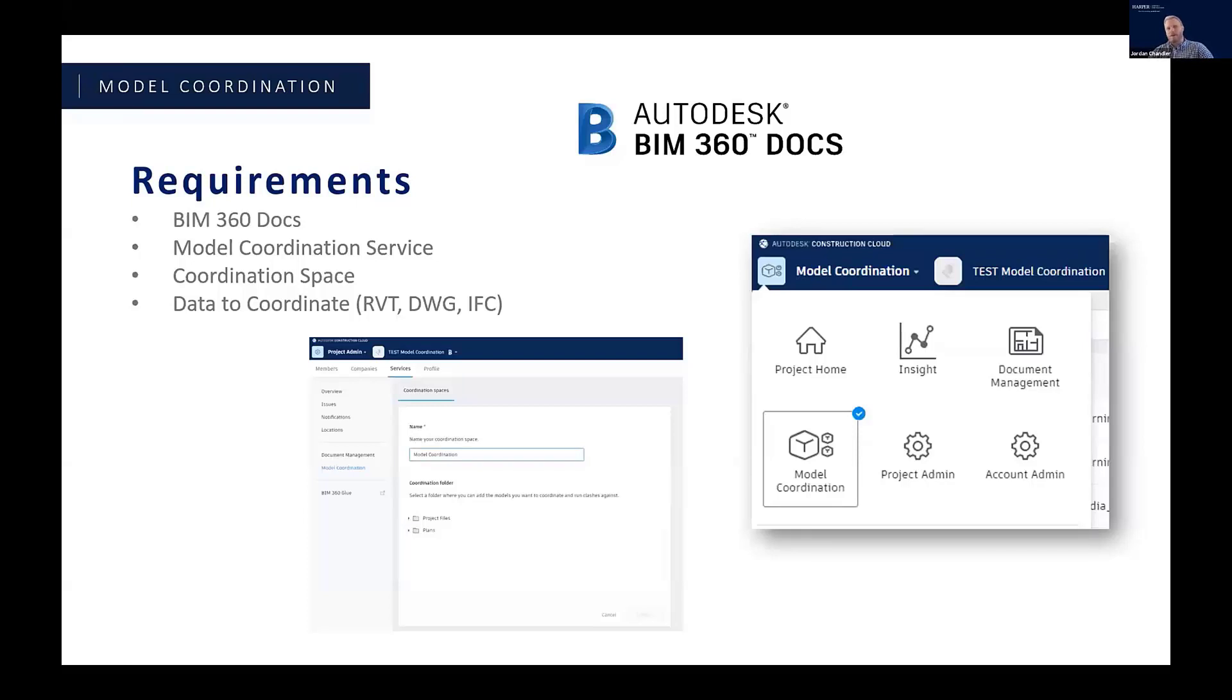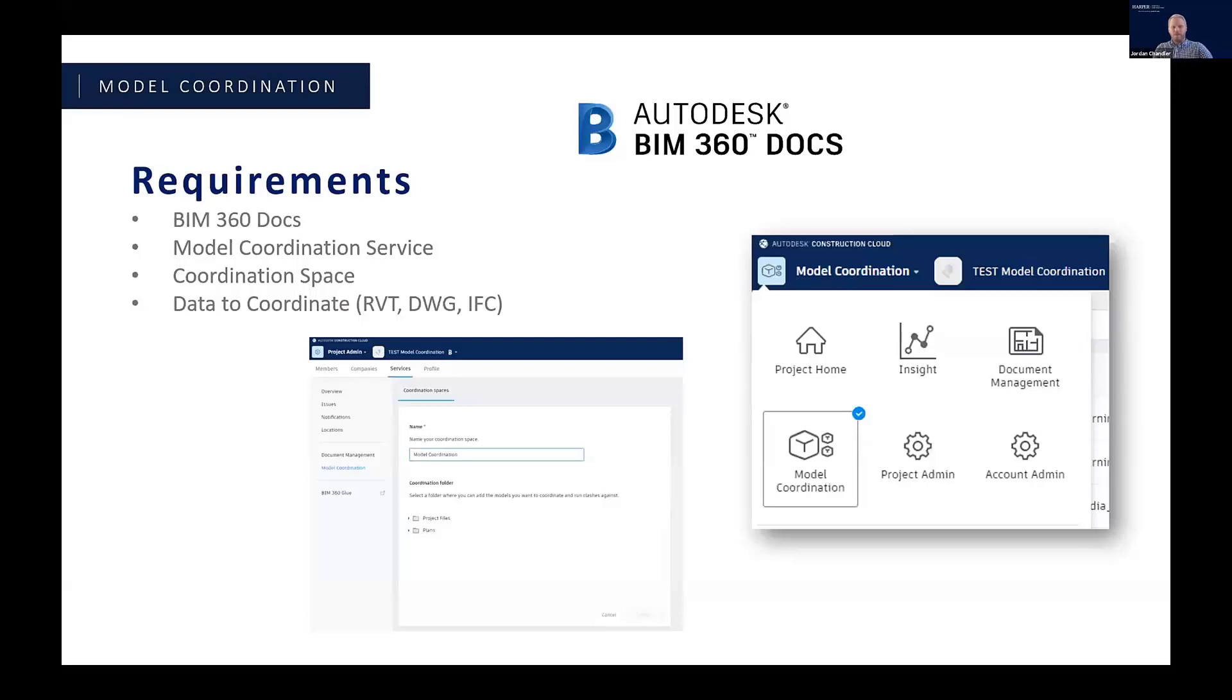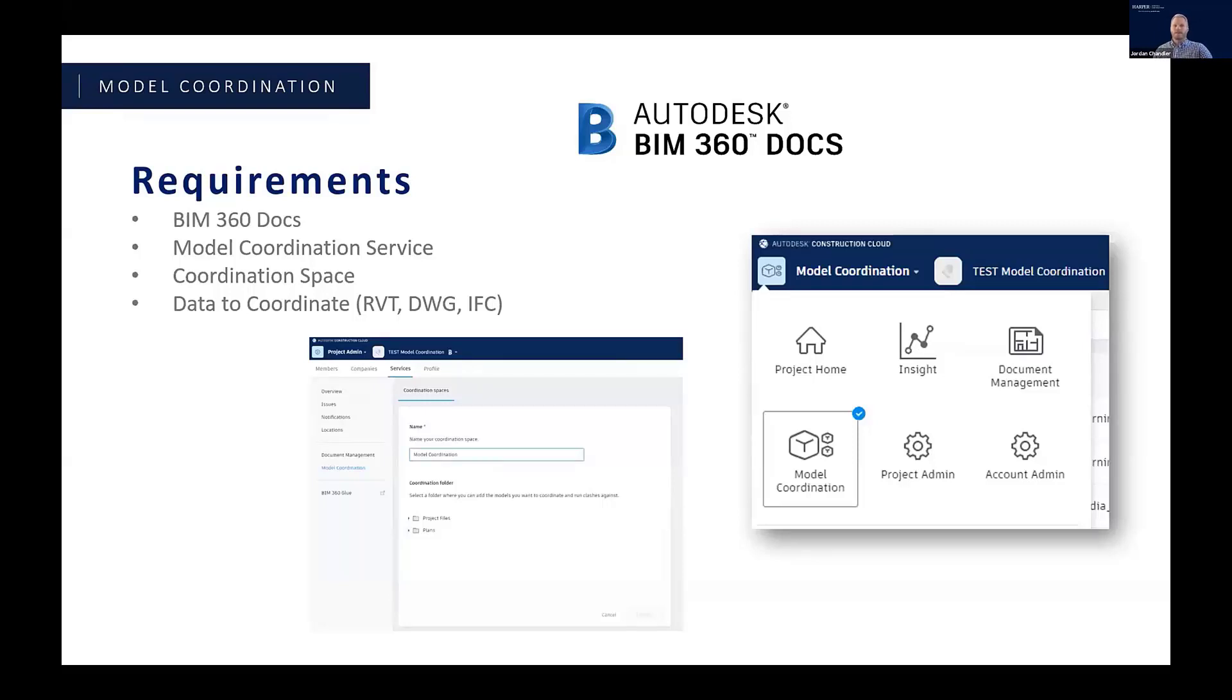Additionally, you would need to enable the model coordination service, and once that's enabled, create a coordination space. A lot of people get hung up on the coordination space and how to get the data in there, so I want to try to give you kind of a behind the scenes on that as quickly as I can. But essentially, if you're used to a Glue workflow or you're coordinating in Navisworks off of a server folder, this coordination space is equivalent to setting up that project in Glue or setting up that folder on your server where all of your data is going to reside that you're using to coordinate.